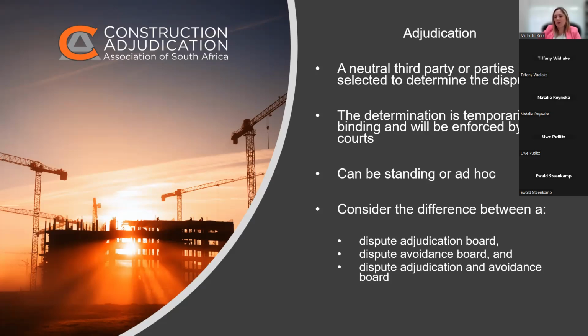Normally, and this is how we understand adjudication, it is temporarily binding, unless or until it's overturned by, usually, court or arbitration, it's usually arbitration. And in most of the contracts, there'll be a period where the party who lost the adjudication, or whichever party is dissatisfied with a portion of the adjudicator's decision, can notify a dispute. And if they don't, it becomes finally binding. And the reason it becomes finally binding is because the parties have agreed to that. So you can actually enforce the adjudicator's decision because you've contractually agreed to do so.